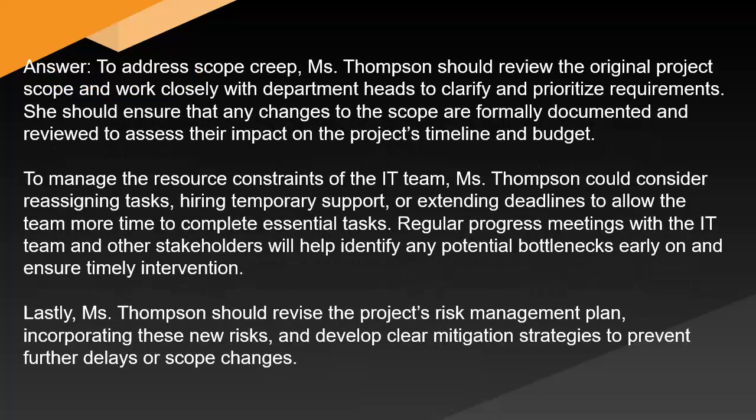Answer: to address scope creep, Ms. Thompson should review the original project scope and work closely with department heads to clarify and prioritize requirements. She should ensure that any changes to the scope are formally documented and reviewed to assess their impact on the project's timeline and budget.